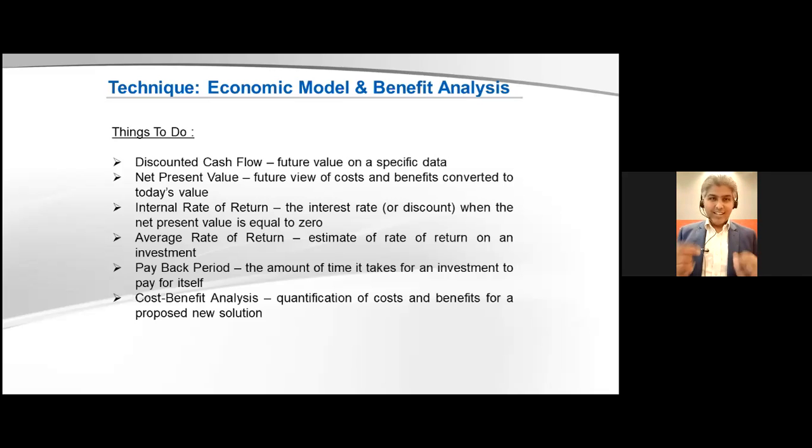This answer comes from discounted cash flow. It sounds good to have 50% advance and 50% at the end of the project, which is 18 months. But considering the interest rate and the inflation rate, that 50% which comes afterwards will be less valued, and the project which has this type, 10% advance and 5% every month, is more feasible financially.